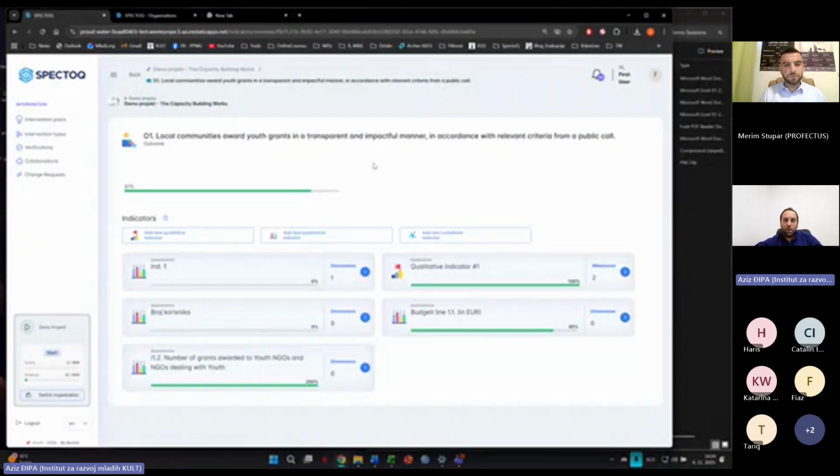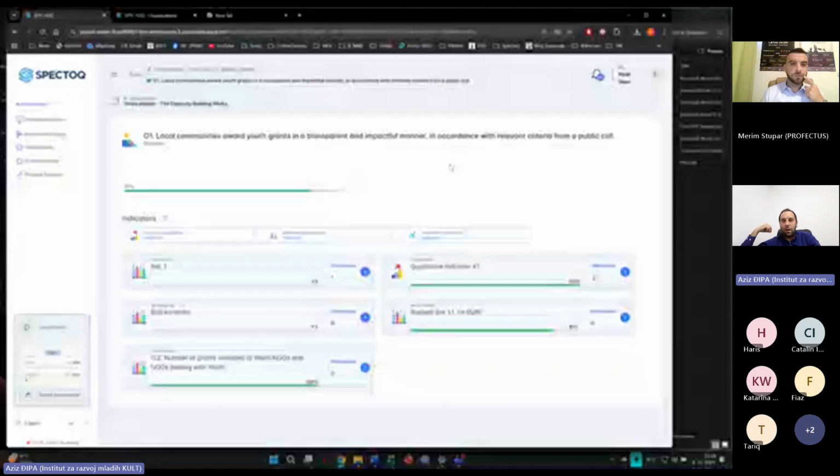In that case, on organizational level or some other result structure, we will define the cumulative indicator, which will be fed through the links of these specific 3 indicators from 3 different results frameworks. For example, number of beneficiaries from project 1, project 2, and project 3 would be linked to the cumulative indicator, which is number of beneficiaries at organizational level.